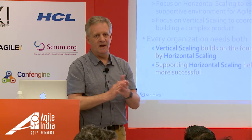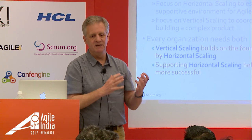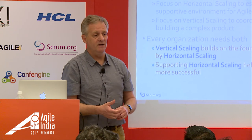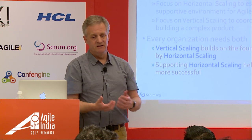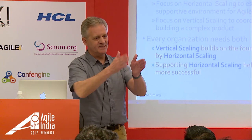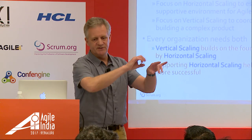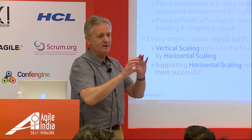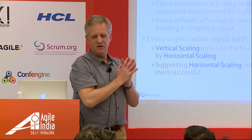So I would maybe challenge the team to say, could we try working on this in a different way for a sprint and say, let's not do strict analysis then design, but let's try to interleave those activities more so that we can get more feedback on a bigger chunk of the product.